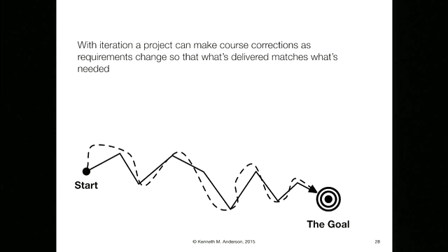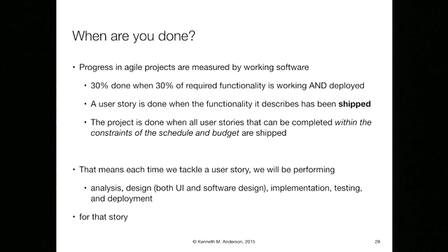All right, now I can skip past those slides. I already talked about it. I've already mentioned this, we'll just emphasize it once again. When are you done? The progress, again, is with working software. So a user story is done when the functionality it describes has been shipped.